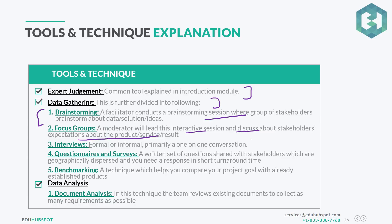Interviews could be formal or informal — they are primarily one-on-one conversations. Interviews may involve multiple people, but the keyword is one-on-one. So if a scenario describes a one-on-one conversation, interviews is the answer. If the scenario says they are focusing on one aspect or one product feature, then focus group might be the answer.